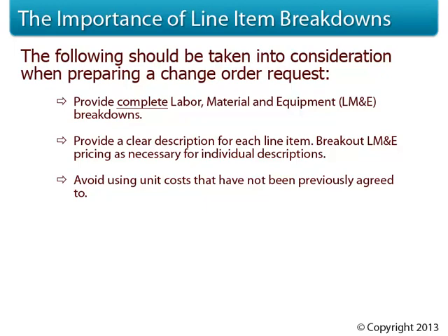But for unit costs that have not been agreed to, remember, unit costs are not tangible. What I mean by this is that people don't think in terms of unit costs. People think in terms of labor, material, and equipment. Don't surprise an owner, CM, or GC with unit costs they've never seen before, because the fact is that to analyze the unit cost to see that they're fair, what the GC, CM, and owner need to do is prepare their own estimate to develop their own total cost and compare their estimated total cost to the total cost of your change order request. The CM, GC, and owner aren't going to use your unit costs at all.